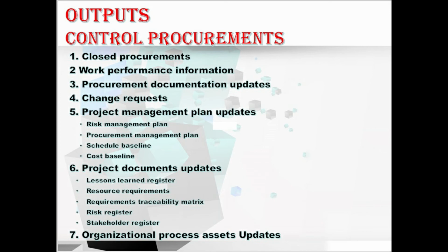If there are any significant schedule changes created by the sellers that impact the overall project schedule performance, the baseline schedule may need to be updated and approved to reflect the current expectations. This is about the schedule baseline. Moving to the cost baseline.